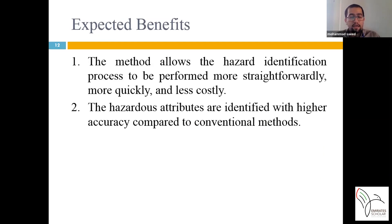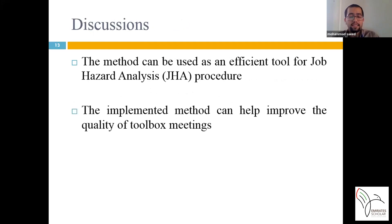Based on the case study implementation and feedback from the project team and safety experts, the method's benefits are as follows. First, 4D BIM made it possible to use computer tools and consequently automate the hazard identification process. Automation allows the process to be performed more straightforwardly, more quickly, and less costly. Second, due to consideration of the relationships between elements and activities, hazardous attributes are identified with higher accuracy compared to conventional methods.